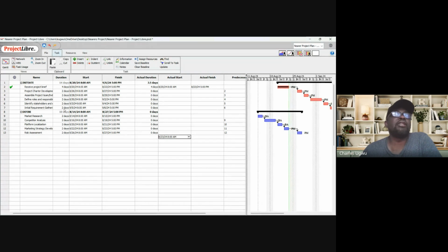But we know that there's what we call unforeseen circumstances. If you can convince the person that it is not your fault, then we create another baseline. Another baseline means that we reschedule, we create another project plan. That baseline will make this current one no longer valid. The original date is no longer valid.